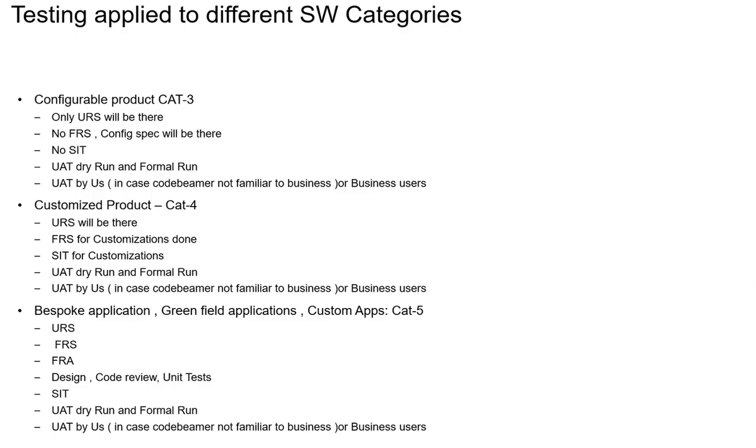For this particular product to be released as a quality product, we have to propose what quality gates and quality implementations are needed. Design review, code review, and unit test, you and I are not executing. It is going to be done by some other team. We have to put that team X is responsible, team Y is responsible, but whatever activities they mention as part of the SOP, we have to capture in our test plan.